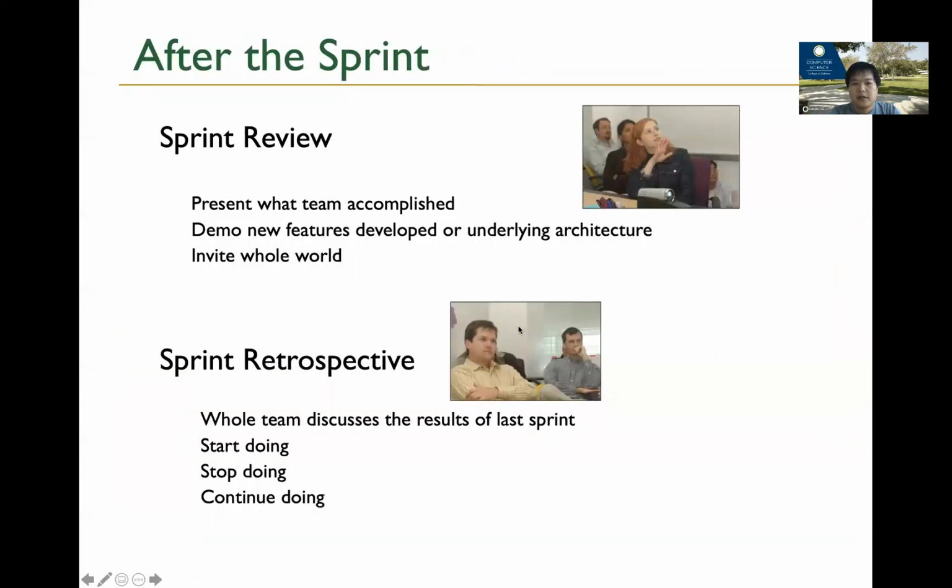After each cycle, each sprint, we also have a sprint review meeting where the team gets together to see how the past cycle went. In terms of goals, did we meet all the goals, finish all the features? In terms of quality, are there any special issues we didn't see, or anything we need to improve?